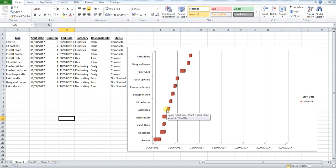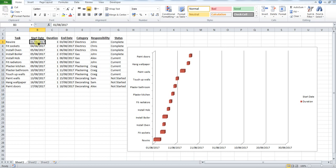What you want to do first of all is look at your start dates and you want to find the first start date and the last date. So here we can see we've got the 1st of August 2017, and our last date is here, 18th of August.